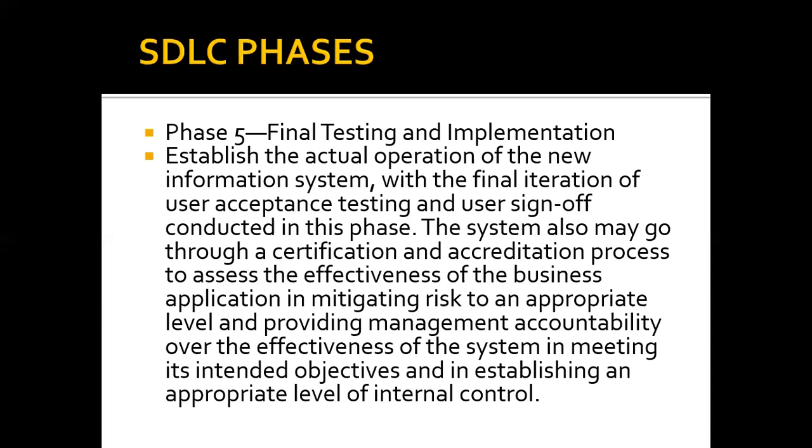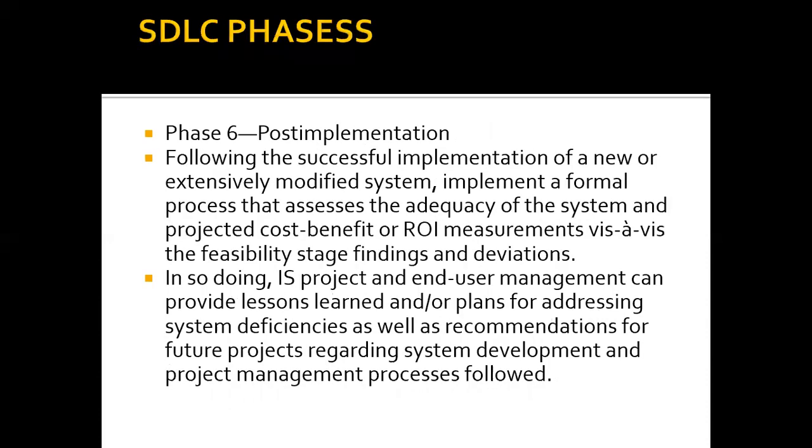So from final testing and implementation, we move to post-implementation. At the post-implementation stage, the project has now ended and the software has stabilized. So basically what we are doing is a post-project review. We want to confirm that the business case is justified. At the project feasibility study stage, we are given a business case. We've been told that we are going to get certain benefits.